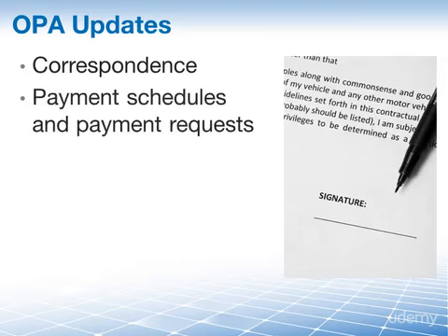Second, we have the payment schedules and payment requests. Remember what we said earlier about the payment system. Most of the time, this is external to your project, so you will have to give your accounts payable a payment schedule, and you must also request that they now pay the invoices that have come in. If you have your own payment system in place for the project, you will have people on your own team working on it. You probably don't need to actually request it for them. They will simply go ahead and pay out according to the contract and invoices.